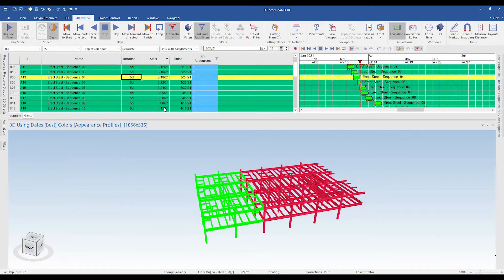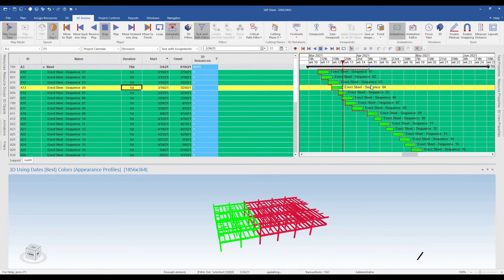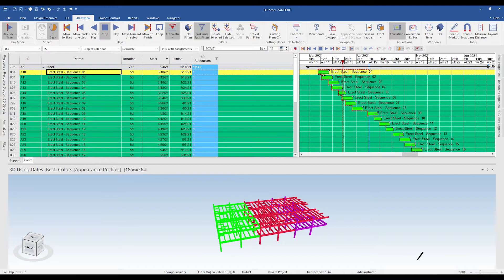Let's do a detailed study of our 4D model. If you look at the activities, something really important to understand is that we have the activities going in a cascading form, and they appear to be in a start-to-start relationship between them. This means that after a particular duration the next sequence erection will be starting, and that is how it is planned to start.